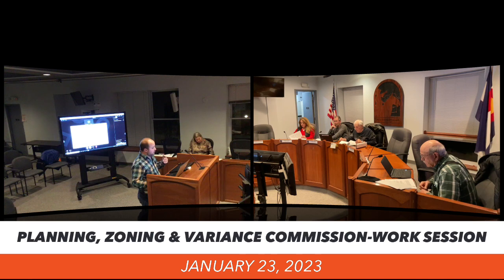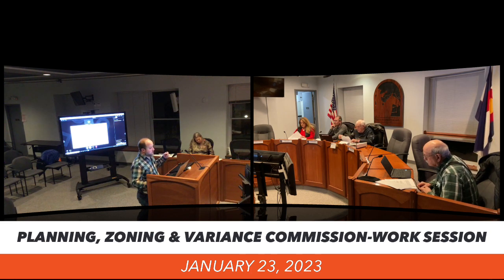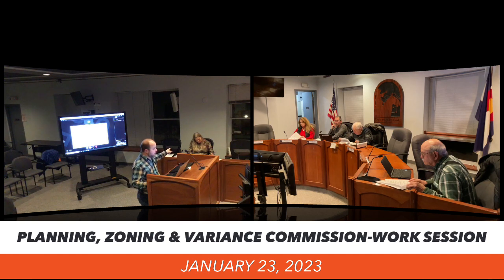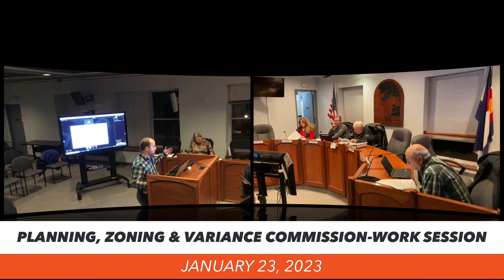So then jumping into the administrative review. Really, the key here is that they submit. They have 7 days for the staff to determine complete, and then the staff has 14 days or 20 days to make an interpretation on that. Within the 14 days, if need be, it goes in front of the development review meeting. It doesn't require the applicant to be there, because hypothetically it should be something that's straightforward.